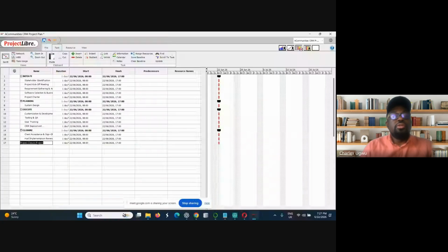So you see our work is taking shape. We are not going to count the number of days under these main categories. The days we are counting are days under the activities.